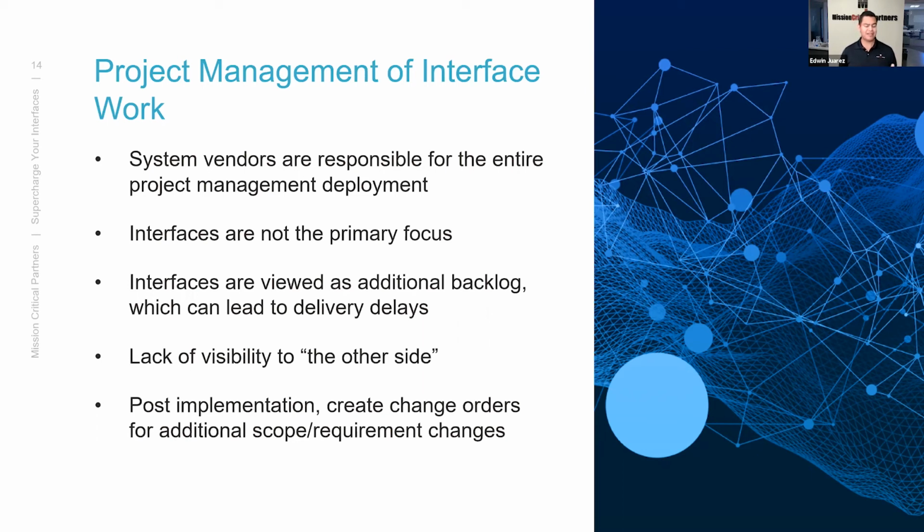And as I mentioned earlier, once the interface is live, it is basically in support mode for what was delivered at that moment. So if there's some requirements change, where the vendor on the other side says, hey, I added some new features and I want to see if I can make this work, or we have a new API that we're going to move to, it's the same solution but we're moving off a legacy interface to an API, those are all scope changes and require a change order, or another project, to get additional efforts changed after deployment.